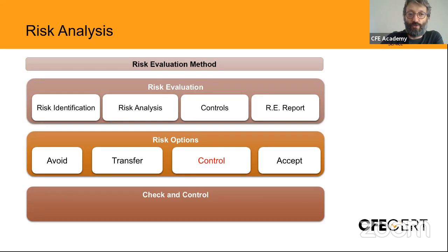Yes, so you identify the risks, you analyze them, you write down your actual controls, and after that you get a risk evaluation report. For the risks over the acceptable level, you are going to apply one of these 4 options, which have to be written in the process as an answer of yours to Article 6. The option avoid is you just make the conditions this risk is creating unavailable. You just get rid of it.